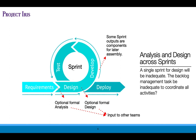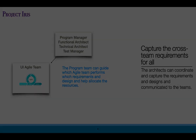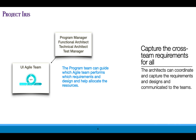There will have to be some changes and accommodations made by the sprint team. We know that there cannot be a single design and that the design will often be complex enough that it won't fit into a single sprint. Some sprints will have components that are purely design, and the output of the sprint will be design components formally documented for another team. Some completed sprint components may not be ready for total integration and have to go into a queue for final testing and integration. It's the program team that will keep track of all the moving parts, assure continuity, and assure the overall integration is moving forward.